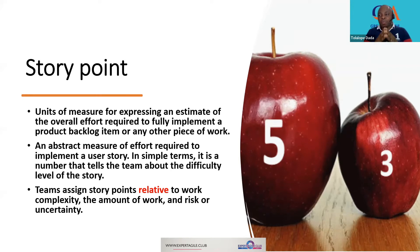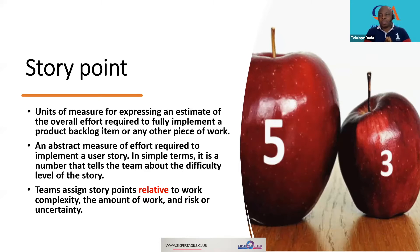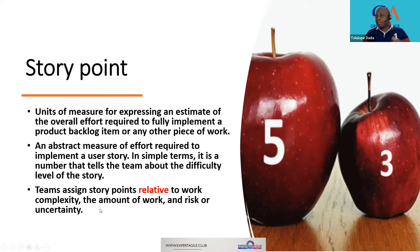It is very important that teams assign story points relative to work complexity, the amount of work, and risk or uncertainty. This relative aspect has been a major concern — many teams have actually removed it from their estimation process, just jumping straight into estimating. But estimation is supposed to be relative. By relative, we mean there is a baseline item that we compare all other items against. For example, if an apple has been assigned three story points, then five story points means how do we arrive at five relative to that three.